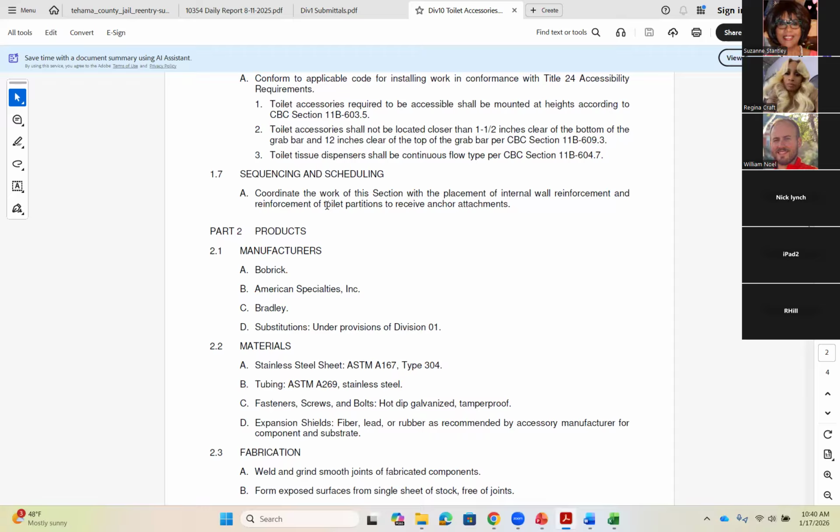So now you can submit a substitution, but the architect and engineer and owner are not necessarily under any obligation to accept that substitution. So you need to be looking at this stuff even before you submit your price, because after you've been given a contract, you're contracted to provide a certain product, and you submit it. If you've bought all that material and then it doesn't get approved, yeah, I mean that's on you, and you have to figure out how to handle that situation financially.